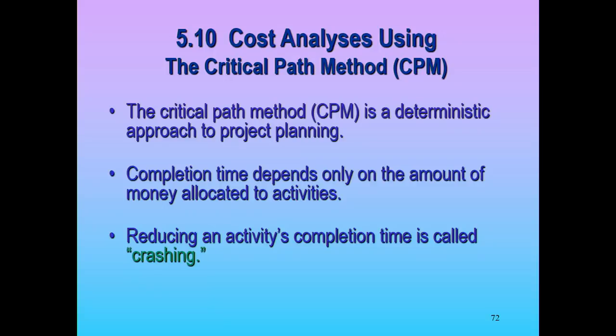Well, what they do in those situations is, usually when you do a project like that, you have dependencies, like, hey, you don't lay the carpet until after the painting is complete, right? And those are called discretionary dependencies, meaning you don't have to do that. So when we do fast tracking, we say, let's get rid of those dependencies. Let's lay carpet and paint at the same time, right? So fast tracking is a method of saying, things that were done sequentially, if they can be done in parallel with one another at the same time, let's do them in parallel, right? And that's kind of when you see those shows, that's what they're doing. They're doing a lot of things that normally have some kind of hierarchy to it at the same time.